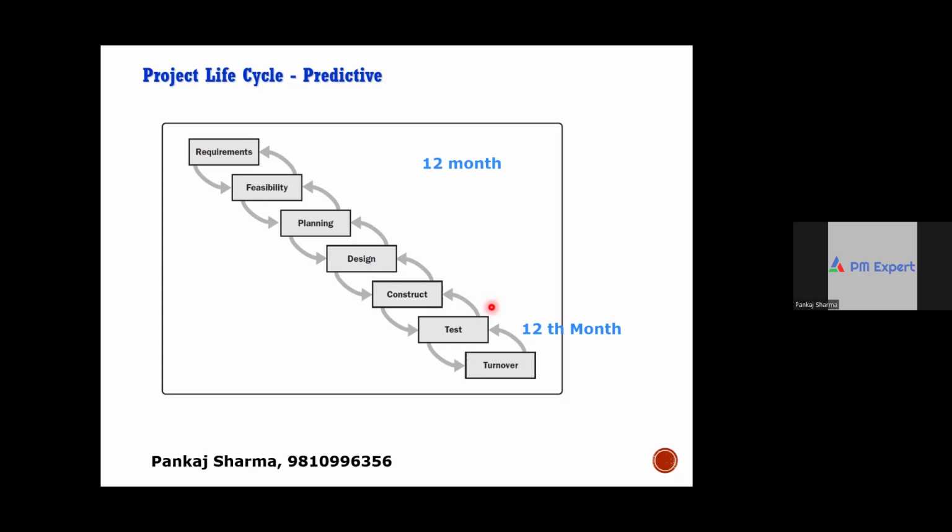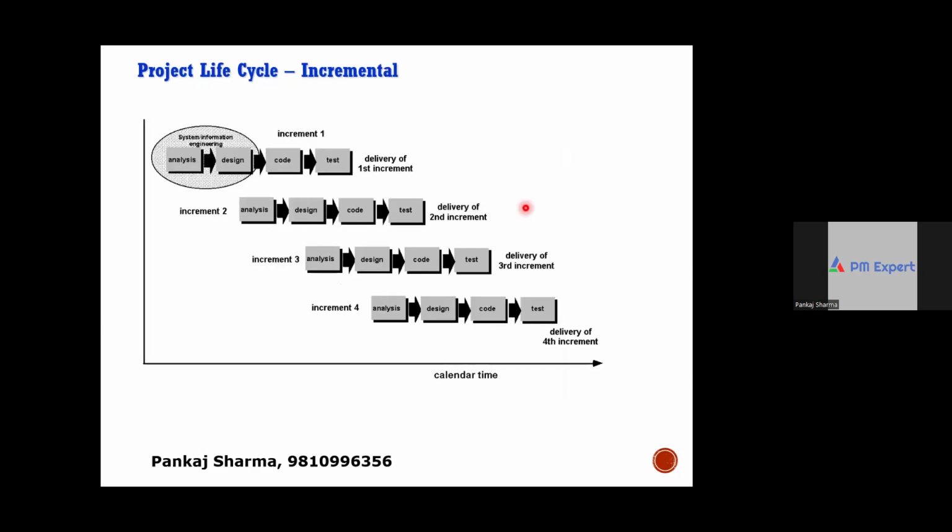For those types of projects, we follow adaptive approaches, and within adaptive approaches also, there are multiple variants depending on the level of uncertainty. So can we move forward, guys? Now, I'll first start with the incremental approach. This is also a kind of linear approach, though here you deliver the project in phases. It's also called a phased approach.